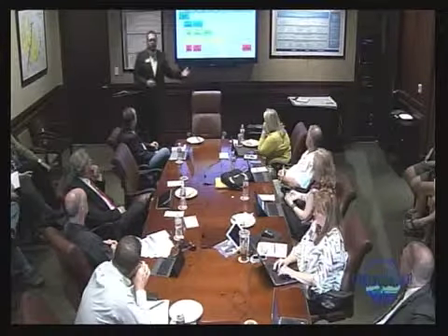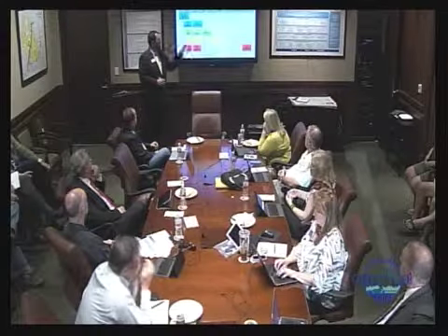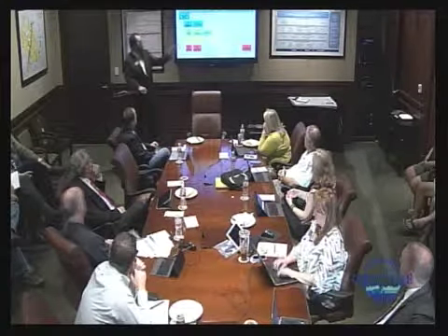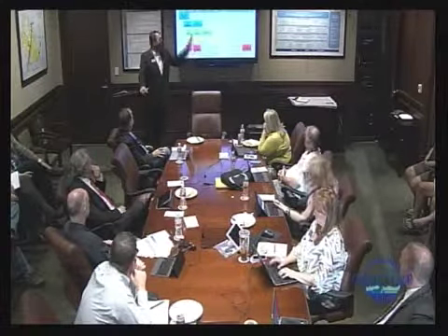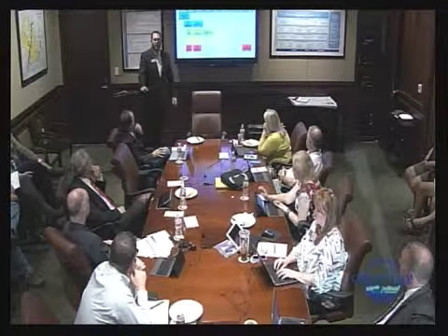One other question on the phasing. We've got phase 4, and we're not starting construction until 22. Would it make sense to wait until closer to that time to do the right-of-way acquisition? We have some potential development out on that section of Glade where we may have right-of-way dedicated through the process. So that's definitely an option. Again, this was basically looking at the available and forecasted funding. One of the initial parameters for this model was to initiate final design and right-of-way acquisition as soon as funding was available, and then stack the construction when the funding was available. But that would be an option.